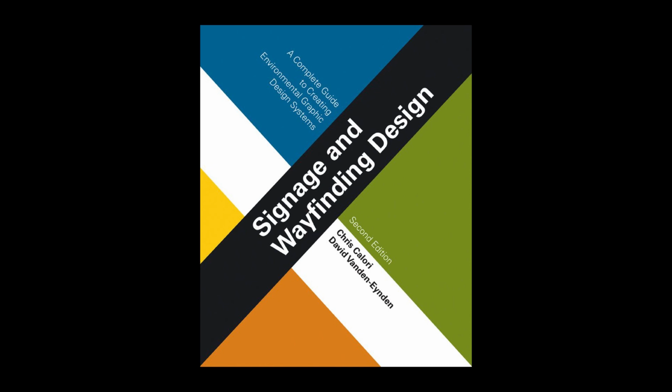Digital photos that show the completed signs as installed are helpful and can actually be proof of work done for payment. Site visits may not be possible on projects with limited design budgets, so photos may be the only way to ascertain how well the fabrication and installation was done.